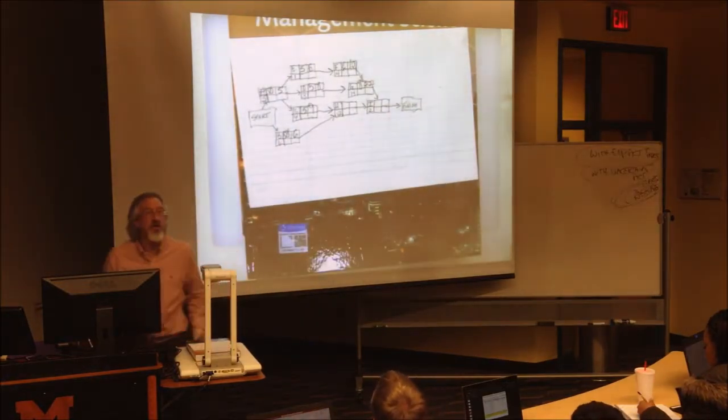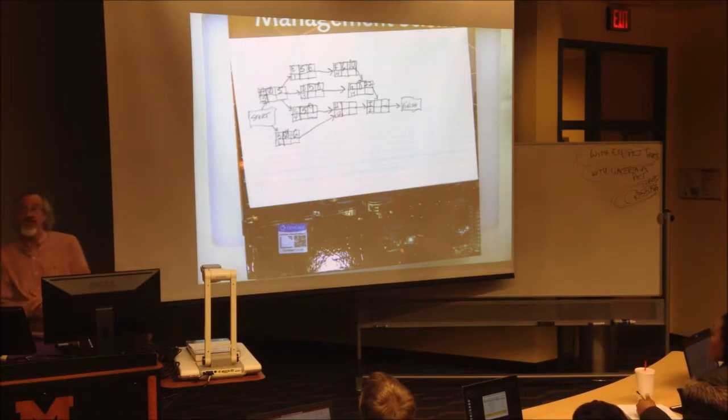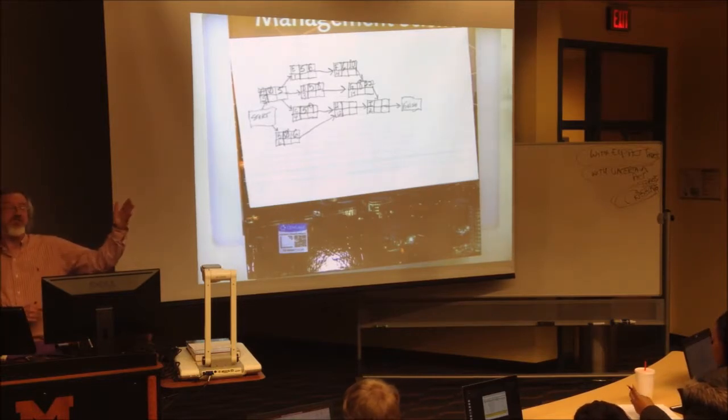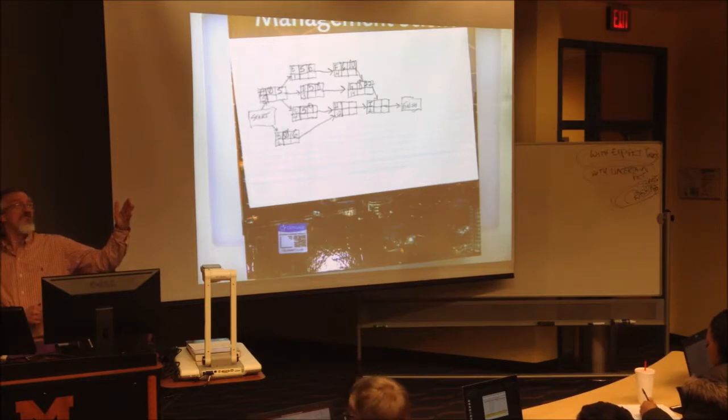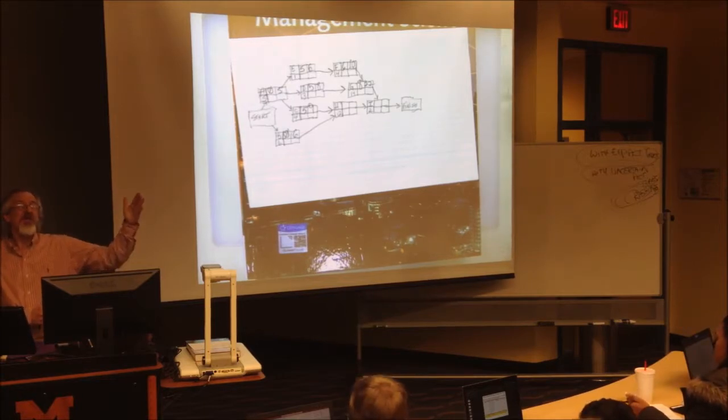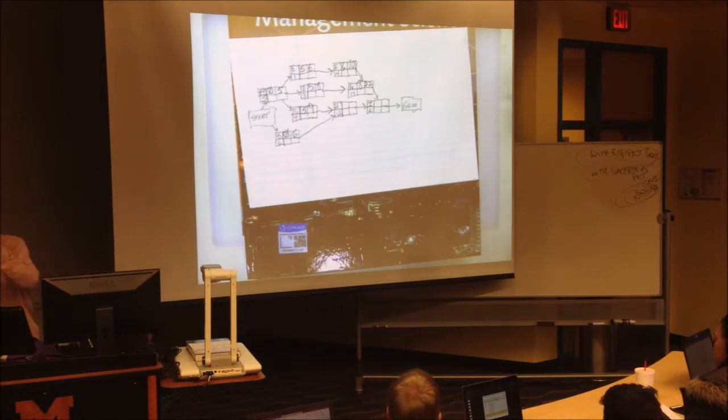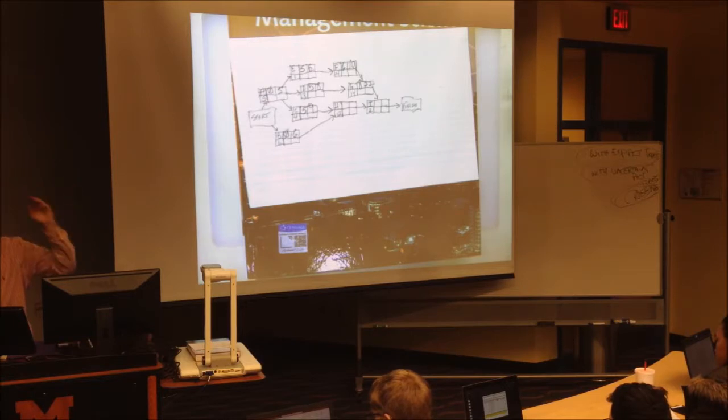H. Okay, here we go. This is the learning lesson. I hope you're taking notes. Here's what you should have written down. You will have a forward pass and a backwards pass in your future, so I want to make sure you realize this. Forward pass, preceded by more than one activity: you must use the largest ending of the activities, because they all must be finished.